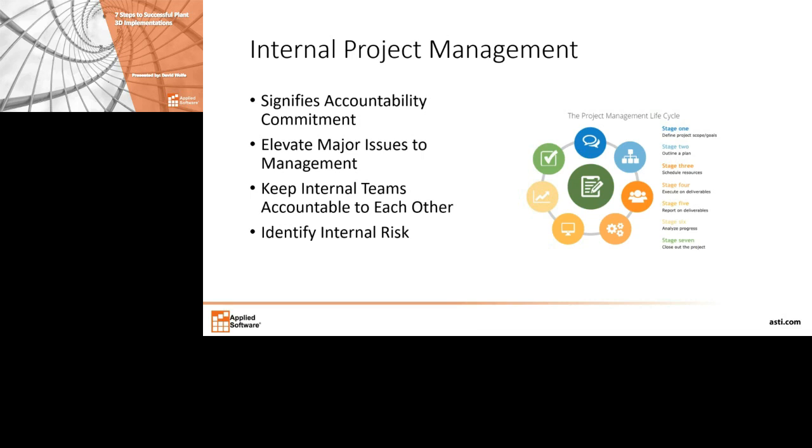And then one of the bigger things that the project manager can do is identify internal risks. Sometimes there are a lot of schedules. You have existing projects and work that is going on. You have people taking vacation time. You have people scheduling field trips to go out and do measurements on a different project.